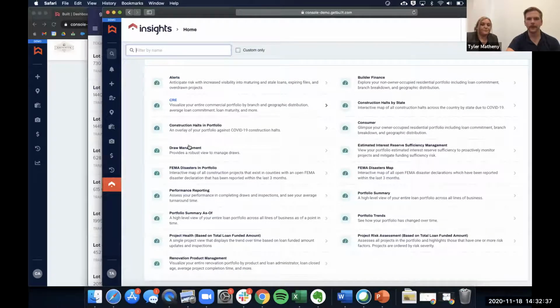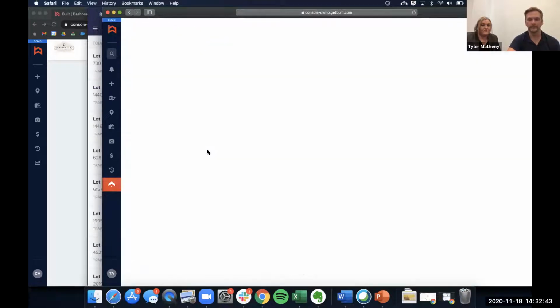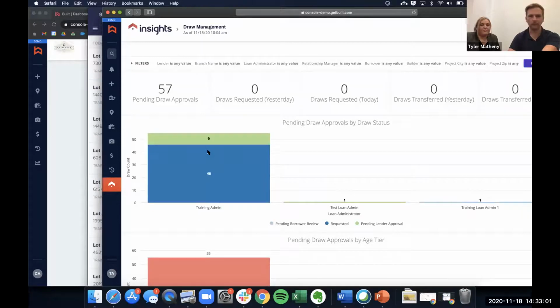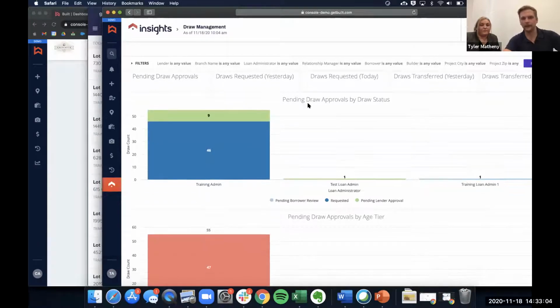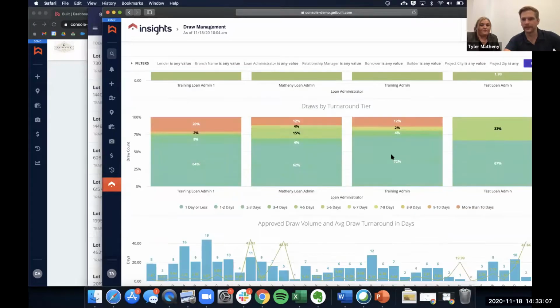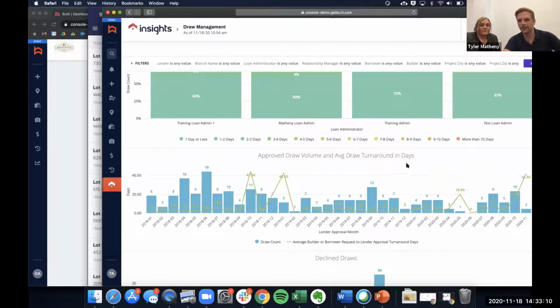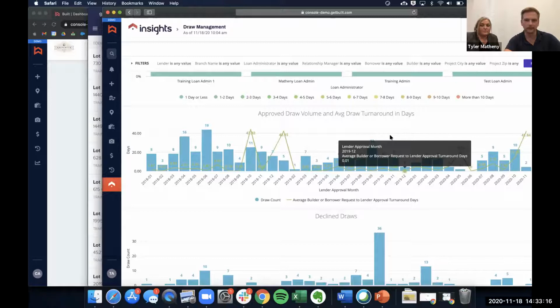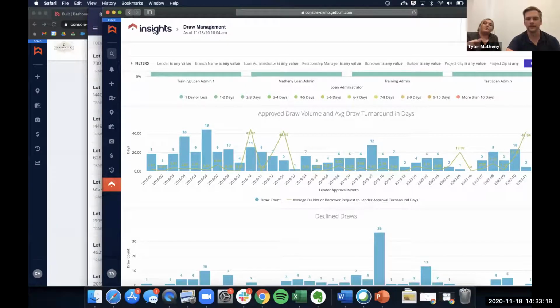So let's say you've got a big C2P program, you've got a lot of draws coming in and out, you want to make sure what is our draw turnaround time? Which admins are getting their draws done the fastest? Who might need more help because they've got too much on their plate, right? You can see all of that without having to maintain a separate spreadsheet, a separate report of draws. You can see how you're doing month over month. You can see trends in draws getting rejected, for instance, and what months we're seeing the most draws getting rejected, or what months we have the quickest draws, and why is that, and start to adjust your team accordingly.